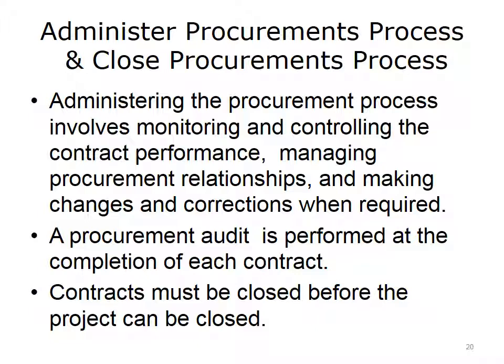The project manager will perform a procurement audit, that is, a structured review of the procurement processes at the completion of each contract. Contracts must be closed before the project can be closed.